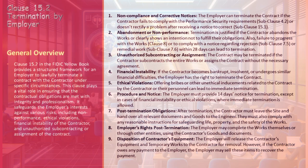Abandonment or Non-Performance: Abandonment of the works or an evident intention not to fulfill contractual obligations can lead to termination. Inadequate progress under Clause 8, or non-compliance with notices regarding rejection under Sub-Clause 7.5 or remedial work under Sub-Clause 7.6 within 28 days, are also valid reasons for termination.